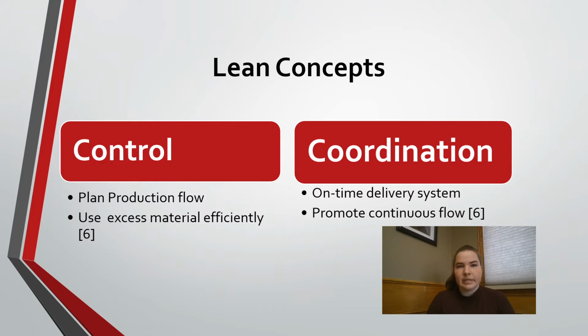Using on-time material delivery methods ensures that materials will not arrive sooner than they are needed and be stockpiled on site. Project schedules that manage resources will also help by coordinating continuous flow.